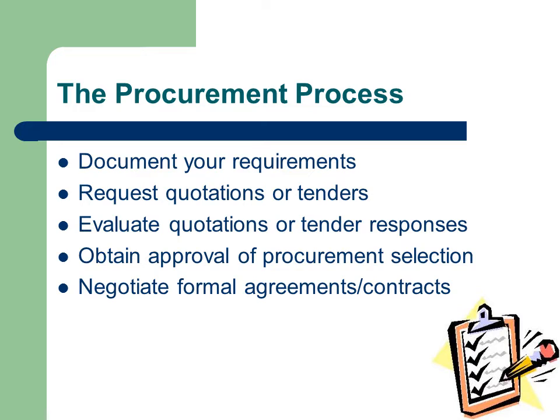Step 3. Evaluate responses by comparing them against selection criteria and then make a decision or recommendation. Step 4. Obtain approval for your recommendation from the appropriate person. And finally, negotiate and sign the formal agreement or contract.